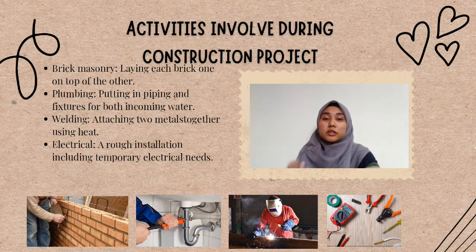Eight is about electrical. Individuals working as electricians on a construction project are responsible for ensuring that the structure will ultimately have full access to electricity from the transformer provided by the electrical company, which is located close to the building. There are several steps that go into the installation of electricity in a build, including temporary electrical needs, a rough installation, and finally the real installation which will be used.